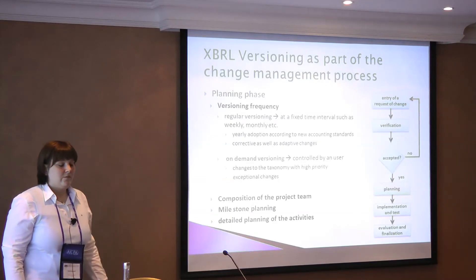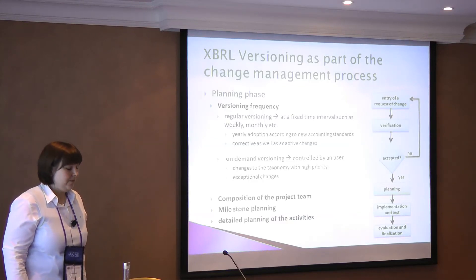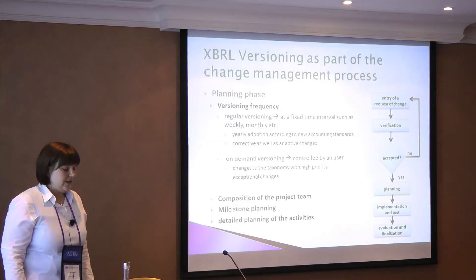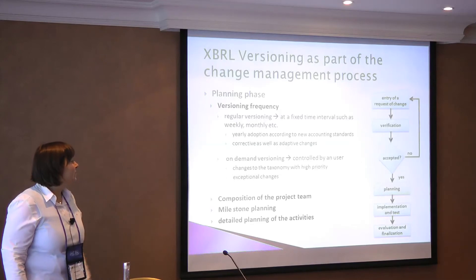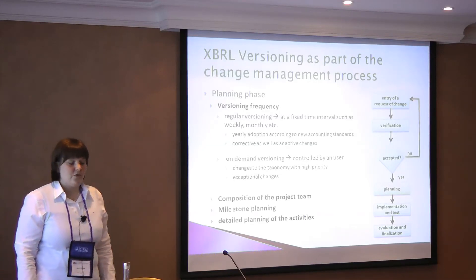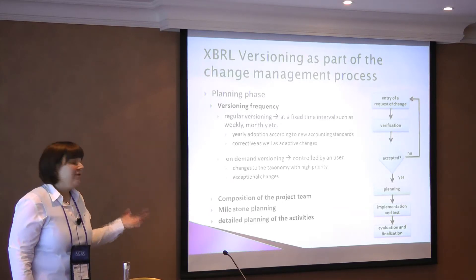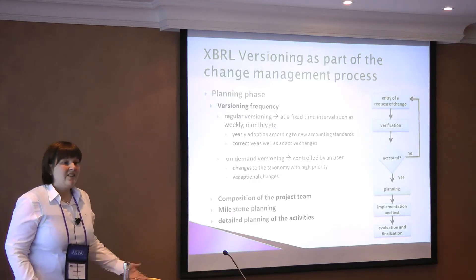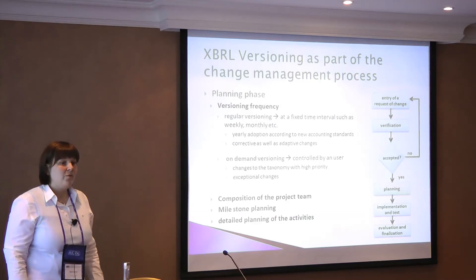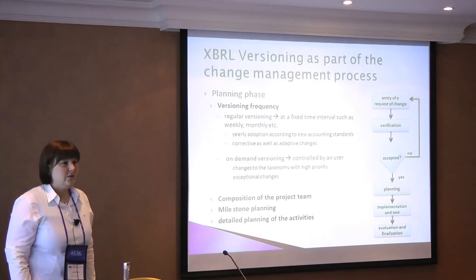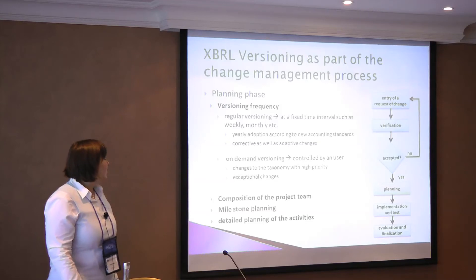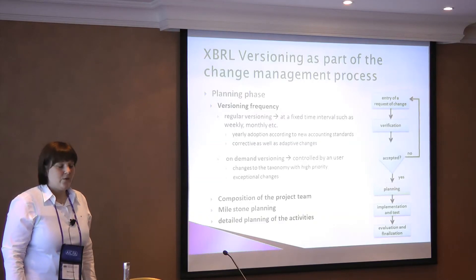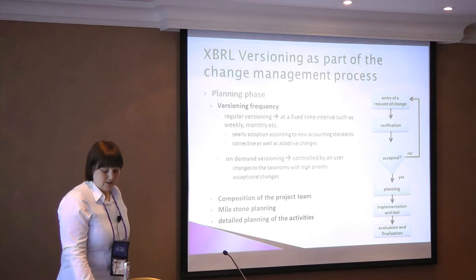We have to deal with the frequency of versioning. We regularly have a versioning every year or every two years to a fixed time, with yearly adoption to accounting standards and regulations, including both corrective and adaptive changes. And we have on-demand versioning — for example, when we find a bug in an early stage of a taxonomy, we have to adapt and publish as soon as possible. These are exceptional changes requiring a very short but well-defined change management process. We also need to consider composition of the project team, ensuring sufficient resources, milestone planning, and detailed planning of related activities.